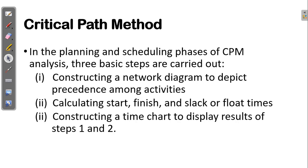In the planning and scheduling phases of the critical path method analysis, three basic steps are carried out: constructing a network diagram to depict precedence among activities, calculating the start, finish, and slack times, and constructing a time chart to display the results of steps 1 and 2.